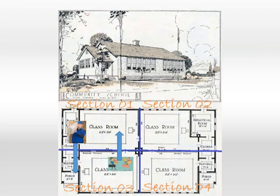For example, a school project may be divided into four sections, but section three may be dependent on section one in the sense that the contractor cannot be given possession of section three until section one has reached practical completion. That may be because the occupants of section three have to be moved to section one.